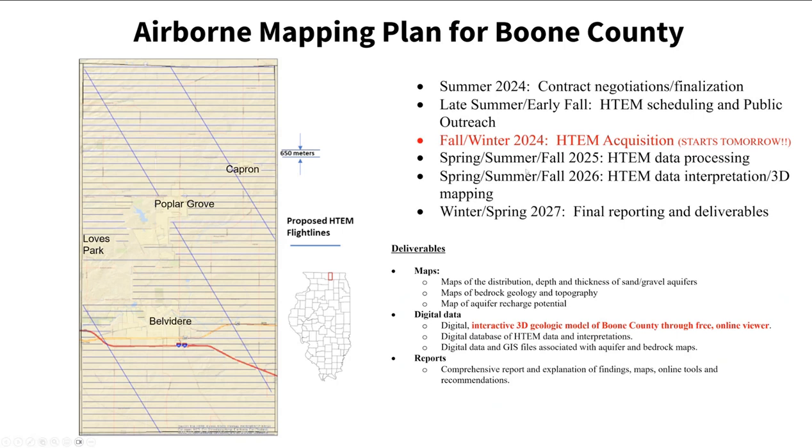But we're anticipating about a 2.5 year project. Final reports and deliverables we're anticipating in winter, spring of 2027. Because it'll take about a year to process all these data, and then about another year to interpret it all in high resolution. And then some of the deliverables we're anticipating is certainly some maps of either the geology or aquifer recharge potential,